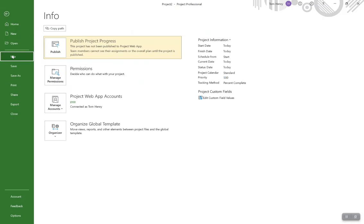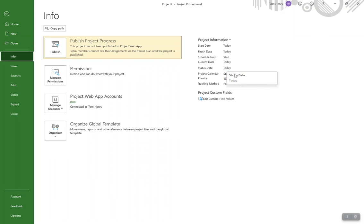Here's your blank schedule. If we go back to File Info, you'll now see all the various information about this particular project: the start date, finish date, schedule from. These are incredibly important pieces of information. When we first set it up, tasks are scheduled from the project start date. The status date, the calendar we're going to use — whether that be eight to five Monday through Friday, different hours, or even different working days for different countries.